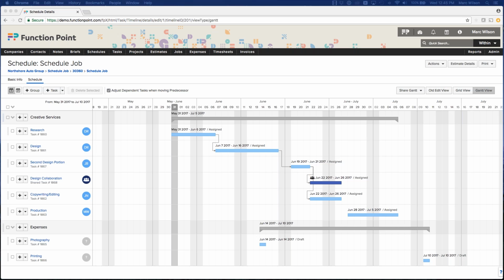You know what? Not really. A lot of things are around notifications right now when tasks are being assigned to individuals. Just a heads up for everyone, we can set up alerts if you want people to be alerted. We can shut them off if you don't want them to be alerted. Another item that someone else brought up was when you're building out the schedule with all these individual dependencies. What we would recommend is leaving all the tasks in a status of draft until you're ready to actually assign them out, so that people aren't seeing crazy changes happening all the time.